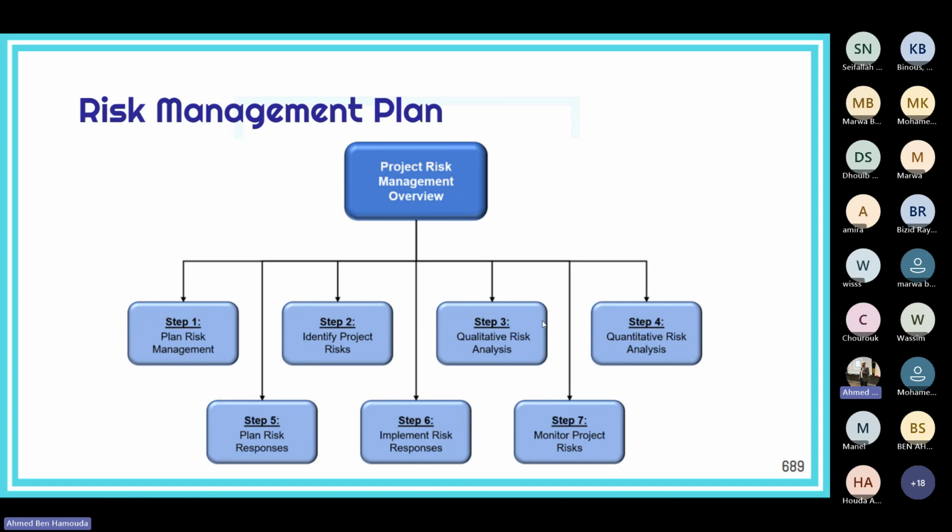And that's always that question that creates a big discussion. And we project managers often need to convince them and explain to them that that's how it's described in the governance of the project, the part related to risk management. The project governance is written: if a risk score is higher than the threshold, then we need to put an action plan, whether it's a mitigation plan or any sort of other response plans, and we need to implement that plan.